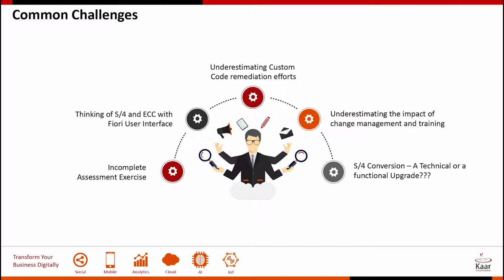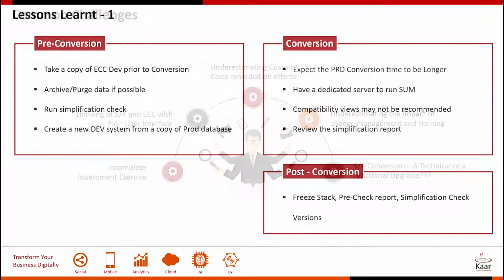Also, change management and training. You'll have to ensure you have proper change management processes and policies built around it, because you don't want to be pushing new projects into your ECC landscape while the conversion is happening. New cost centers, new companies, and whatnot. If you do that, you're bound to fail because you're making the S4 project happen on a very fluid, not a stable environment, because things change all the time. And again, it's more a functional upgrade than a technical upgrade.